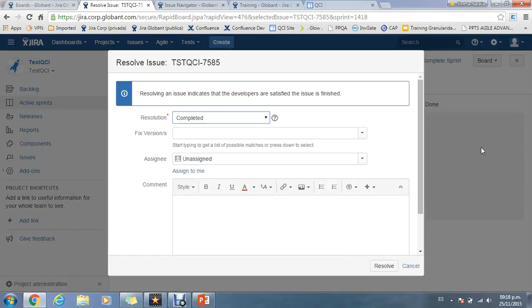Using the taskboard allows us to see if we have many non-finished tasks, identify which tasks are blocking our progress, team synchronization, and check if a bottleneck exists, for example, a lot of testing tasks pending. The daily Scrum or Scrum meeting is a good moment to monitor and control the task work.